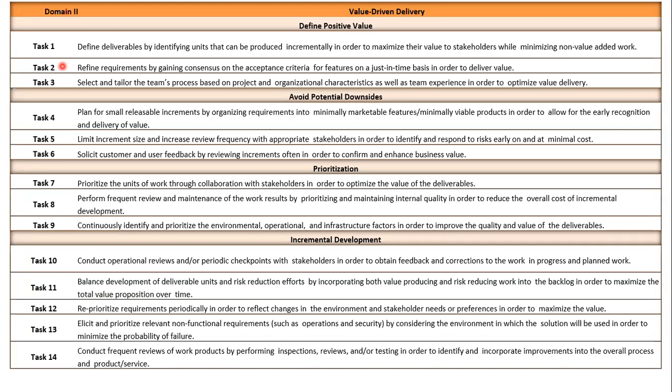Well, the confirmation is the acceptance criteria, but that evolves as you go through various layers of backlog refinement, the different sprints, going through sprint planning each sprint. That is how these things become more solid and emerge. Now, we're not talking about the definition of done because that is very different and that is more overarching and far-reaching and pertains to increments. This, on the other hand, is about stories.